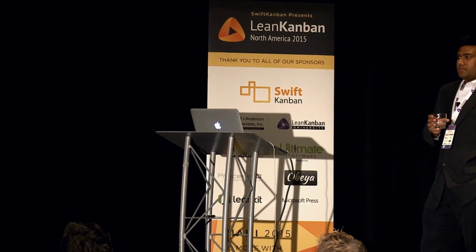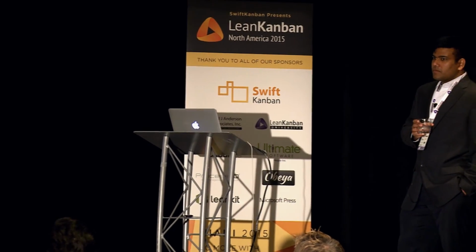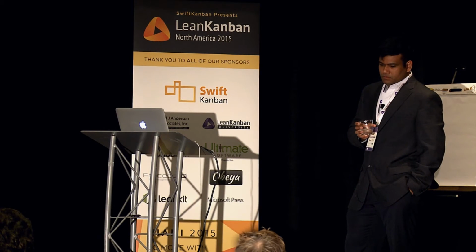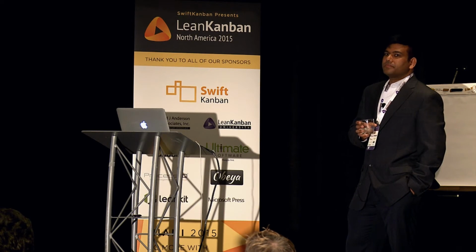Let's take a look at story 121 from Javon's team. As a customer, I want to be able to access current balances and transaction history for all of my accounts across all lines of business. There's a lot of functionality contained in this single story. It can easily be broken down into multiple elements. For example, one story to deliver access to all personal deposit accounts, another for all personal loan accounts, and so on. We call this technique vertical slicing.